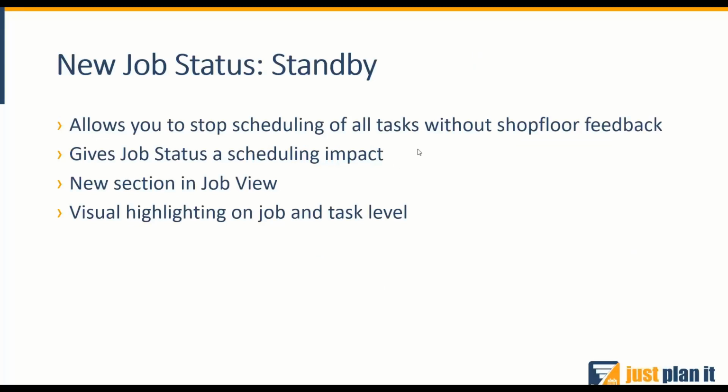So if you do set a job on standby, that allows you to stop the scheduling of all tasks without shop floor feedback. That of course means that if you did the drafting part and you also managed that in Just Plan It and that is finished, that information stays as is. As always, the operator feedback, the actual shop floor feedback that you have approved in your plan is reality to us. So therefore, this stays scheduled. But anything that is still ready or even just planned, we do not schedule anymore.